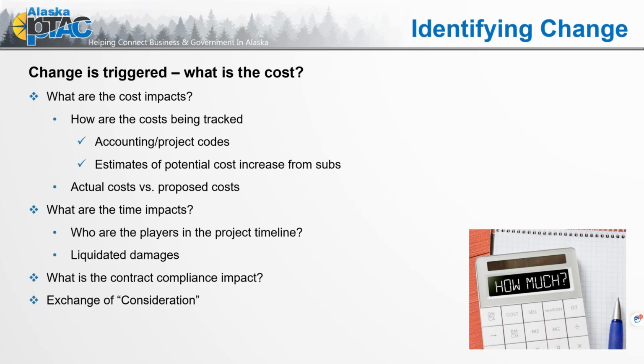If there is a fund limitation, and we do have a significant cost, would it benefit your bottom line to have additional time for completion if there is a cost ceiling just because of availability of funds? So think about that when you're negotiating that change as well, both time and money, that exchange of consideration.